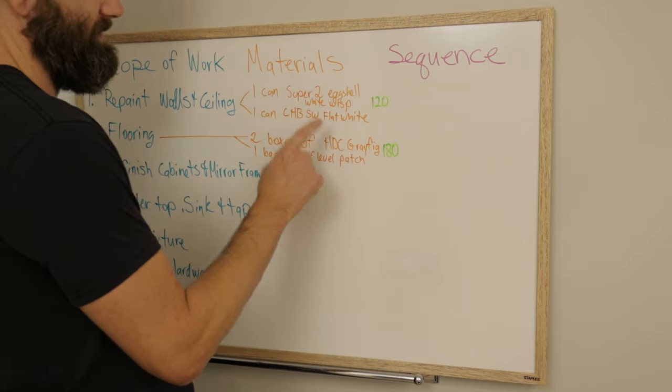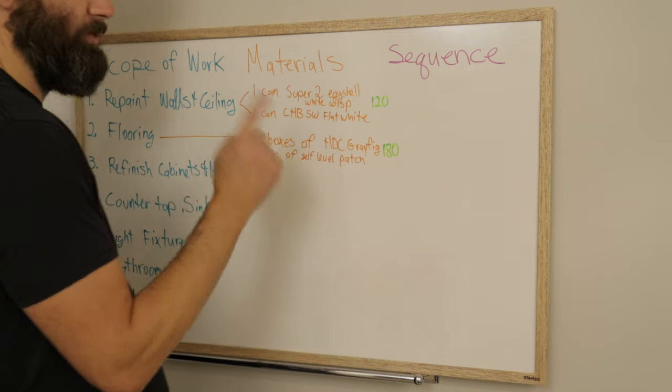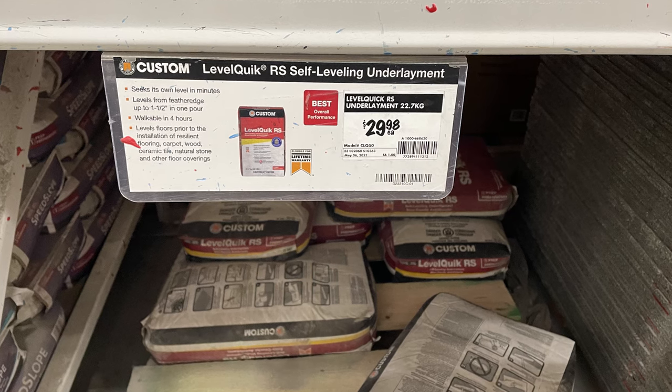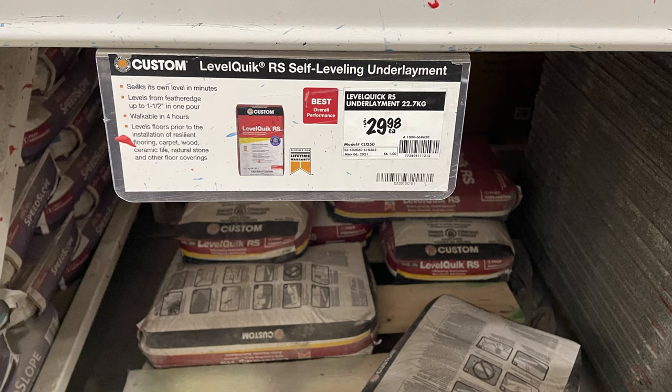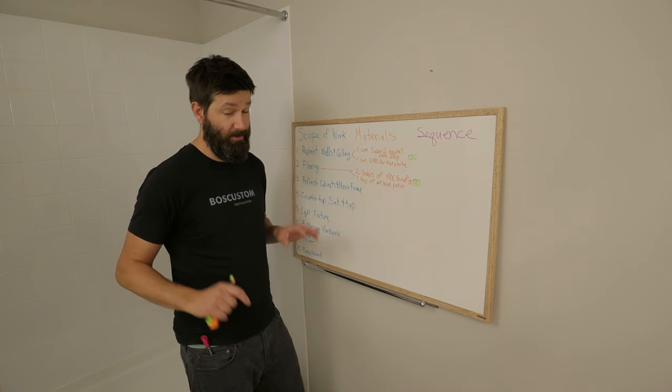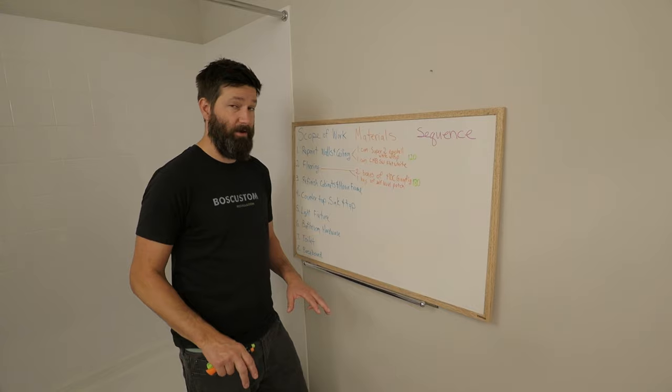So I'm going to be installing the vinyl plank. I'm going to need two boxes of the home decorator collection gray fig. I'll need one bag of self-level patch in order to patch over this tile floor so that I can install the vinyl plank right on top of it.